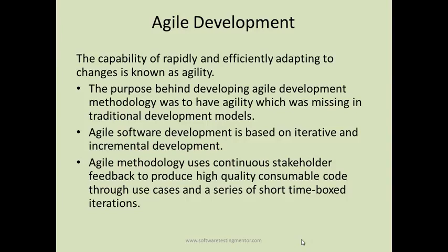Depending on the organization, some choose 2 week sprints, some choose 3 weeks, and some also choose 4 week sprints. Based on how the organization wants it, they choose those sprints, and then all the requirements are gathered at once and lie in the product backlog.